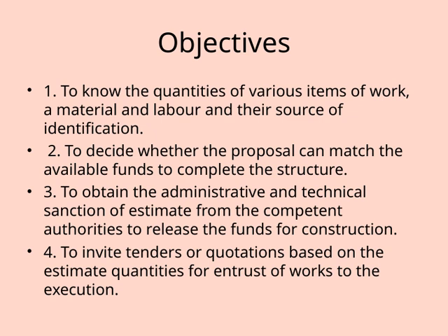This means accurately estimating what's needed and understanding where to find the information about these quantities. Having a clear grasp of this helps us plan effectively and avoid surprises down the line. Next, we need to decide whether the proposal can match the available funds to complete the structure. This is a crucial step because it ensures our project is financially feasible. If the costs exceed the budget, we might need to revise our plans or seek additional funding.